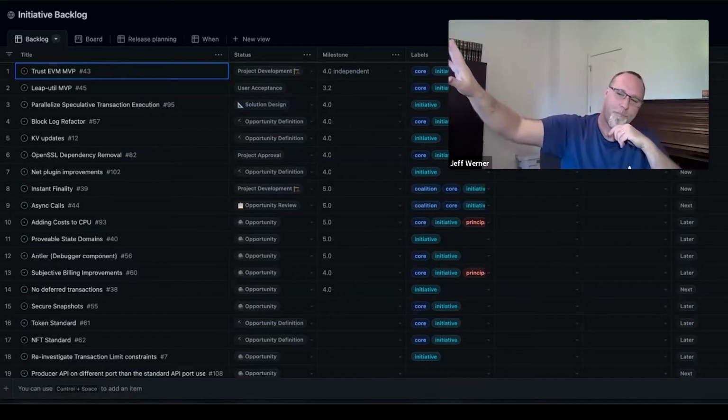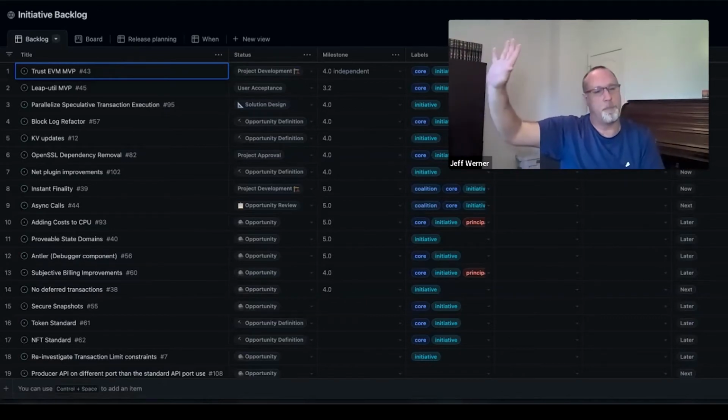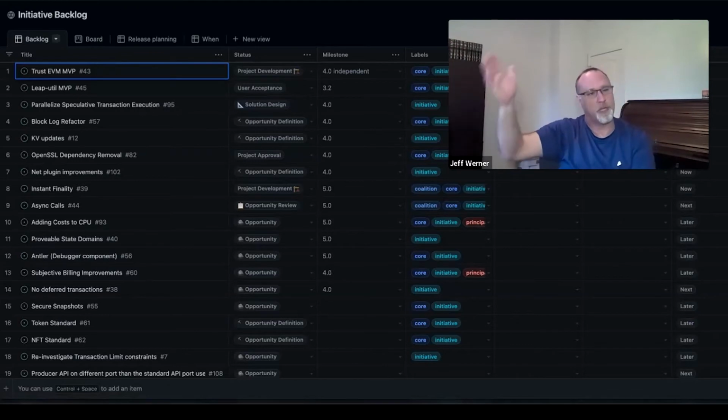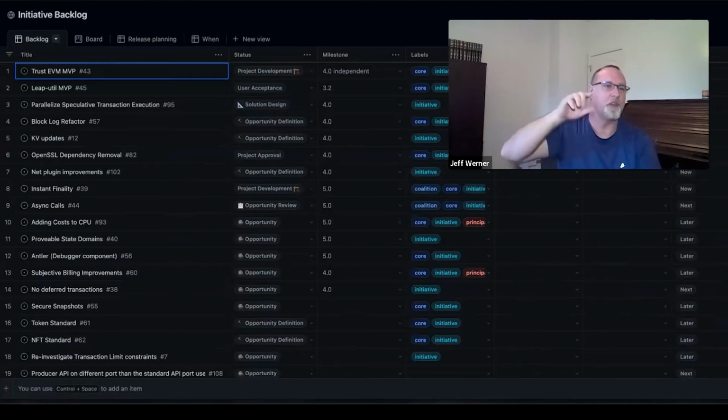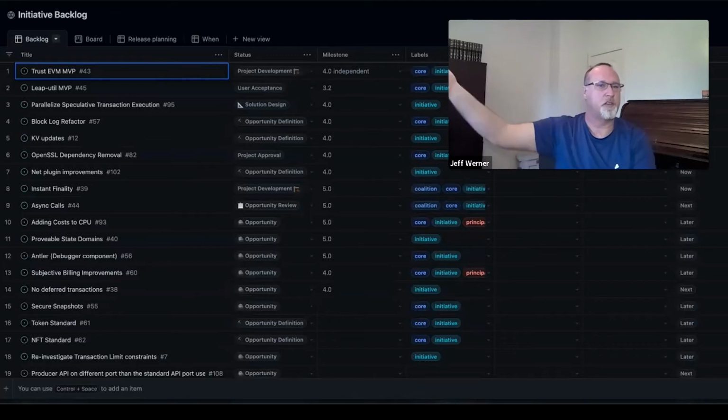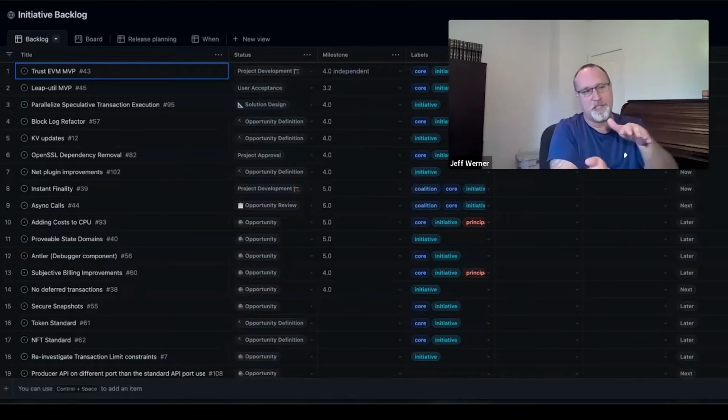Okay, if this instant finality is a predictive, waterfall type project because it's built on milestones, right? And Agile doesn't play nicely with fixed milestone dates. What we do is we reduce the capacity, or the velocity, you would say in Agile, for all of the people being pulled off of our normal Agile sprints, saying, okay, REG is going to spend X% of time on these waterfall projects. Otherwise the rest of his time is in the Agile methodology. Is that clear as mud?